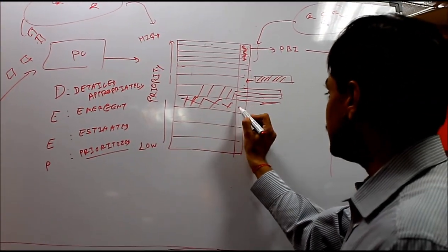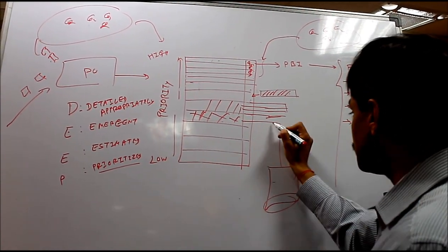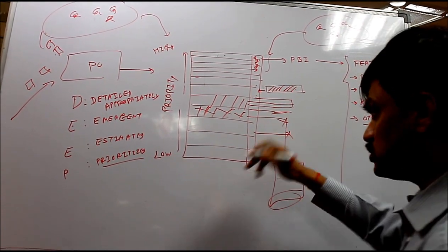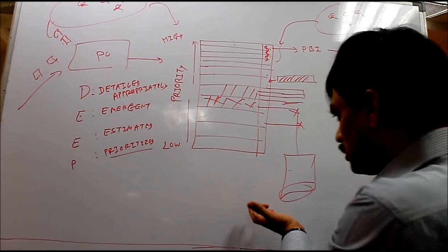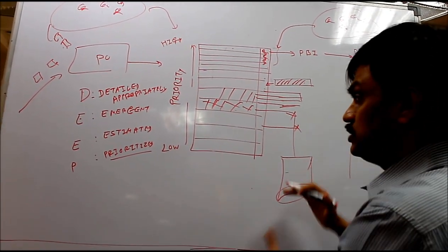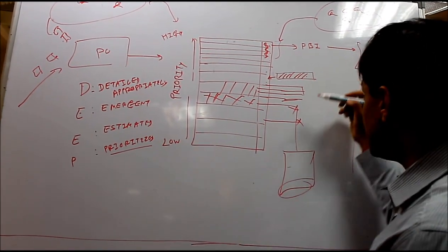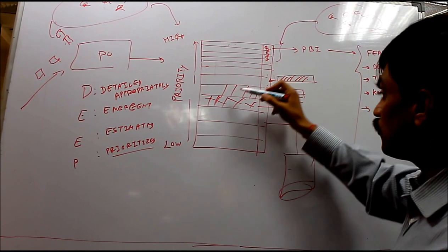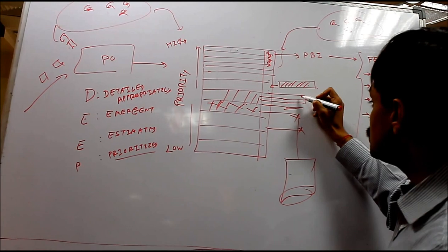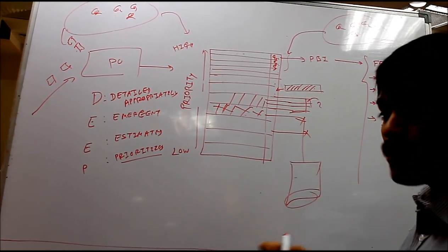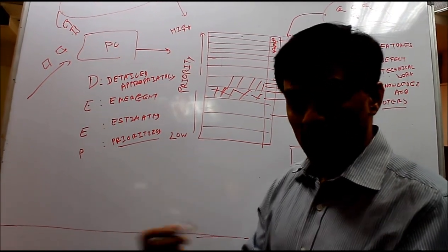He may decide that these items do not require to be developed anymore, and the deletion related work also falls under product backlog grooming. So you can remove them and put them into a recycle bin where they can be looked at before we want to delete them permanently. So deletion is also a part of product backlog grooming. And estimation. Whenever we are inserting a new product backlog story, or whenever we are splitting an existing product backlog item into smaller items, we also need to estimate again. So estimation of newly emerged product backlog items also falls under product backlog grooming activity.